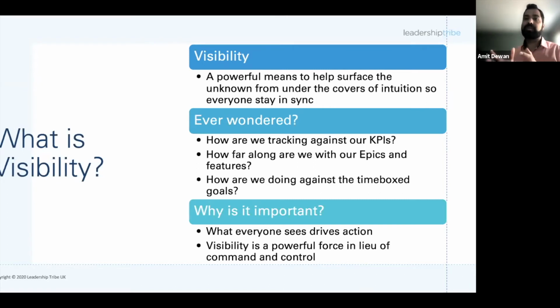You'd see those coming to action, because now these pick up data directly from the user stories that the teams are working on and getting accepted. So that's one powerful way. And the example I just gave you is at a portfolio level, but then it translates into program level, team level, and there are different types of reports that you could build to communicate with your stakeholders. Dashboard number one is an executive dashboard, for example. Dashboard number two is more of a program dashboard. Dashboard number three is more of a team level dashboard.